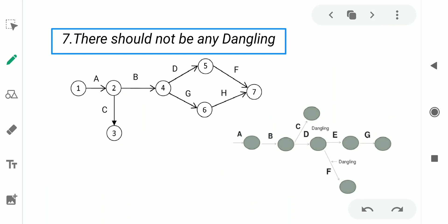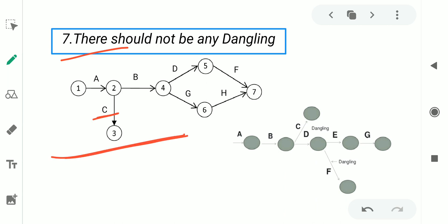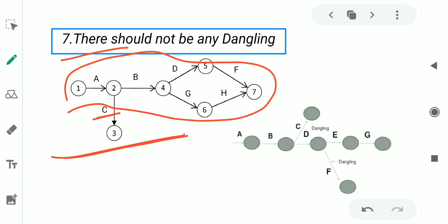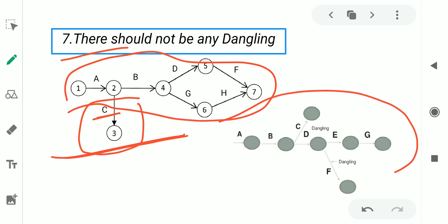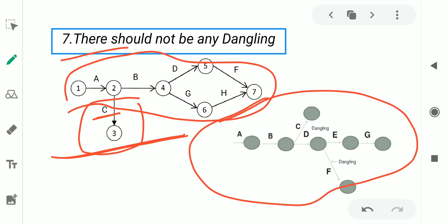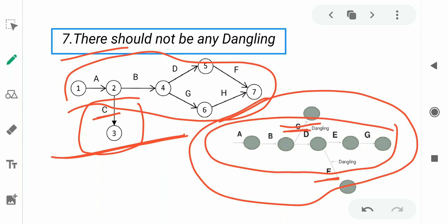The seventh rule is there should not be any dangling. Dangling occurs when an activity is disconnected from the whole network. In this particular network, activity C is disconnected from the whole network, so a dangling error occurs. In another figure, activity C and activity F are both disconnected from the whole network, so a dangling error also occurs there.